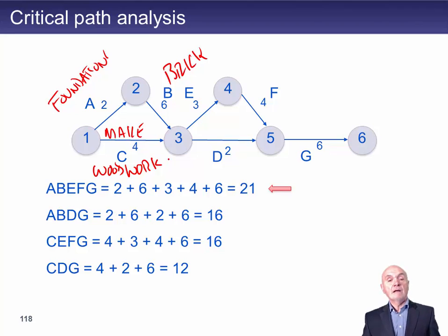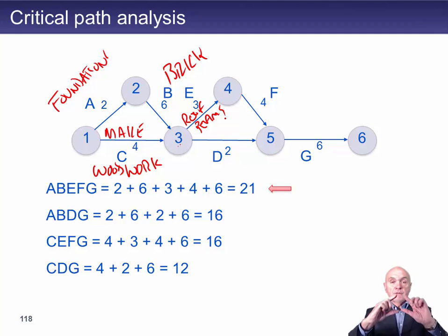And then at point 3 here, we have foundations, and we have the shell of the house, the bricks are there and so on, and we have the woodwork ready to fit. So what we will do here is I'll say that this is the roof beams. So we've got the bricks up. What we're going to do is put the roof beams on top of that brickwork.